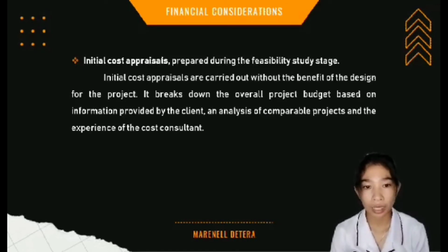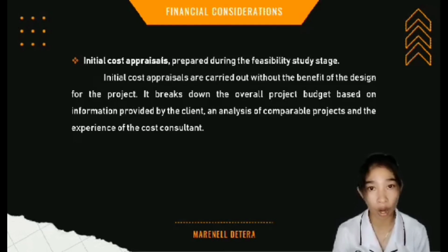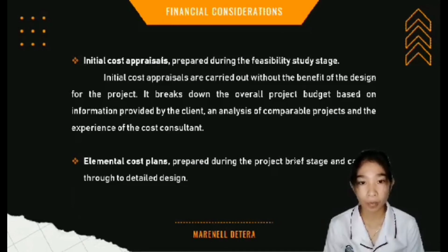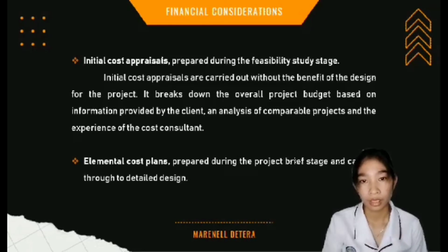Initial cost appraisals break down the overall project budget based on information provided by the client, an analysis of comparable projects, and the experience of the cost consultants. Next is elemental cost plans. Elemental cost plans are prepared during the project brief stage and carried through to detailed design.